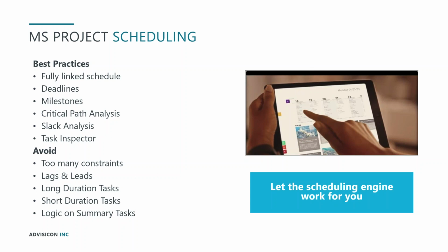A lead would be a situation where you can start work on the successor task before the predecessor task is completely finished. You might say, as you're doing requirements gathering during a project, that halfway through your requirements gathering, you're going to be able to start to prepare a sign-off document. And so you would lead the completion of the requirements gathering task by 50%, and that would then pin your successor, develop the documentation, to the midpoint of that predecessor task.